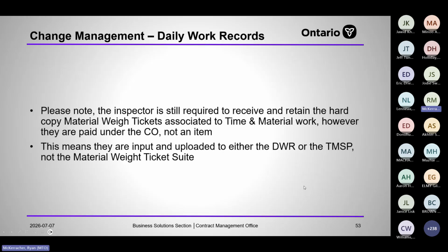Please note the inspector is still required to receive and retain the hard copy material weight tickets associated to time and material work. However, they are paid under the CO, not an item. This means they're inputted and uploaded to either the DWR or the TMSP, but not the material weight ticket suite.